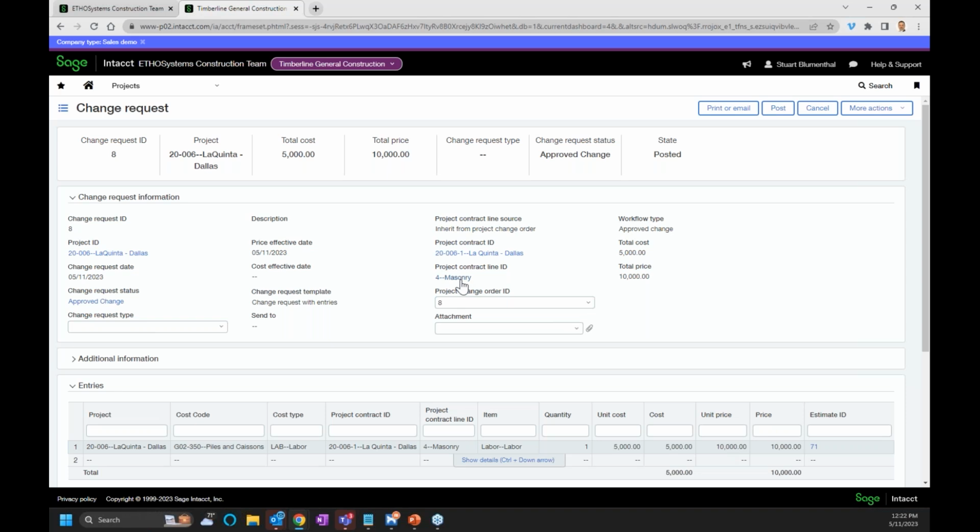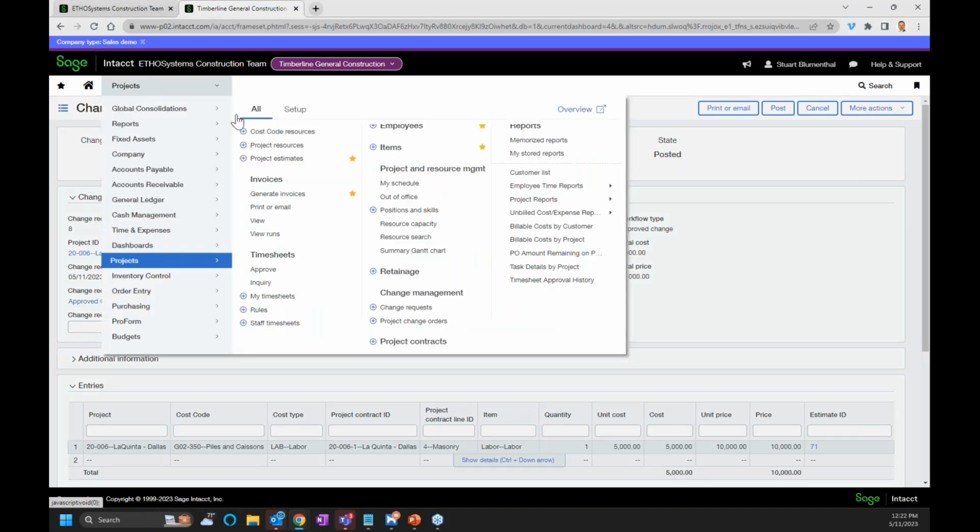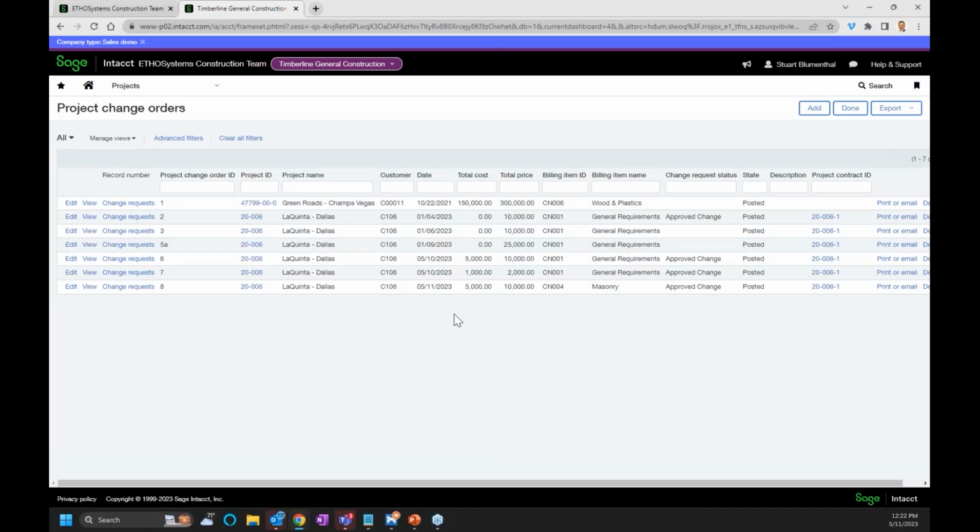And once I do a billing on this line, this next section would be locked down further because I've now done a billing against that. If I've done a billing, it locks it at that point. Great questions. Hopefully I've answered them. If I did not, please ask.